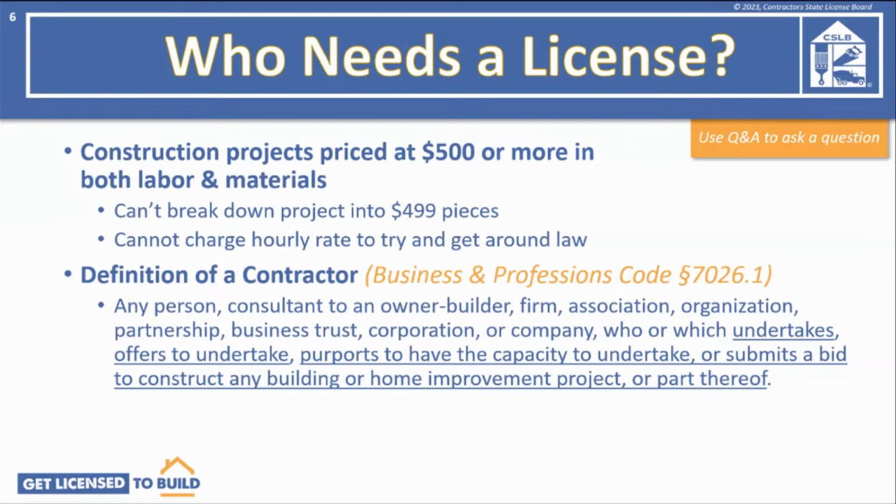In other words, you don't have to do the work to break the law. You must have the contractor's license just to advertise that you can do the construction work, or even to give a bid for a construction job if the bid totals $500 or more.